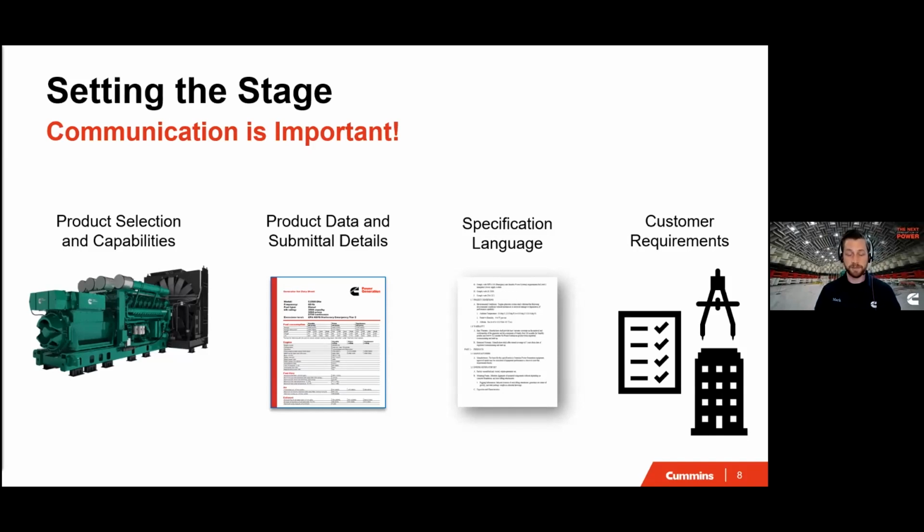Included in the submittal may be generic items such as outline drawings and data sheets, but also integral to that submittal is usually a sizing report with the manufacturer's sizing software, showing that the generator is the best fit for the job. What we'll spend most of this presentation outlining is an understanding of that sizing.